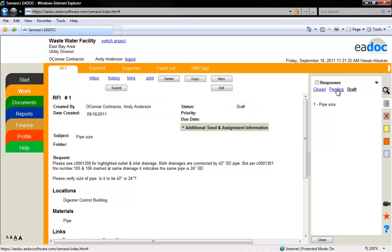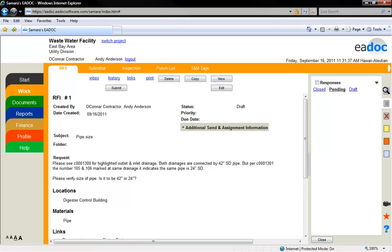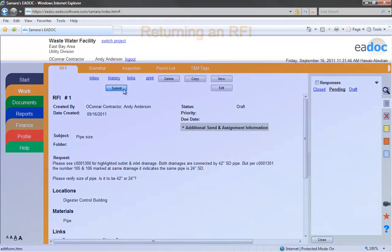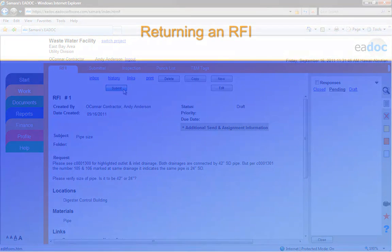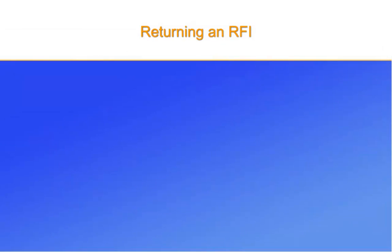You can see that the Edit and Delete buttons are now available. Once further action has been taken on this RFI, the Recall or Return button disappears. Further action can include responding, forwarding, approving, or closing. After you edit the RFI, you will need to submit it again.